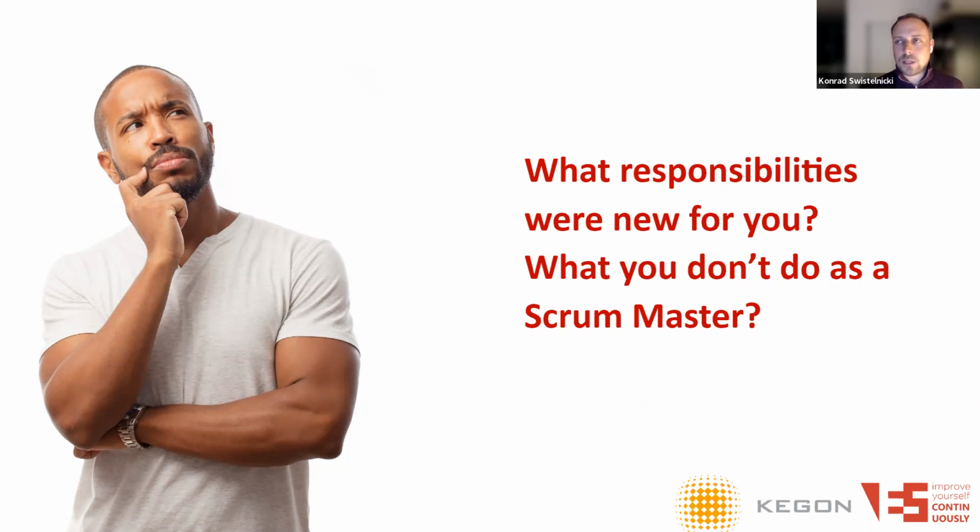Similarly, if we think about ART sync meetings, a sort of Scrum of Scrums on the Agile Release Train level, we might define it as a separate sync meeting for the RTE and Scrum Masters, and POs with PM, so product management, or we would have this as a joint event for all of those roles. And this is another opportunity when the Scrum Masters would be collaborating with product management or interfacing with them. Okay, we have a few more comments, just to read them.